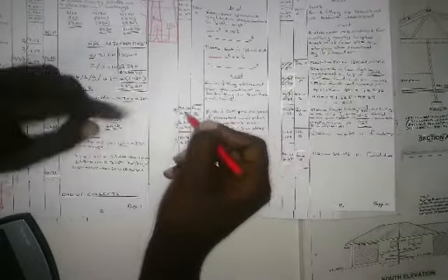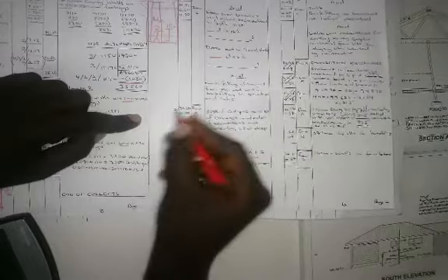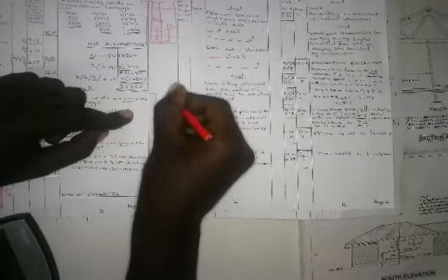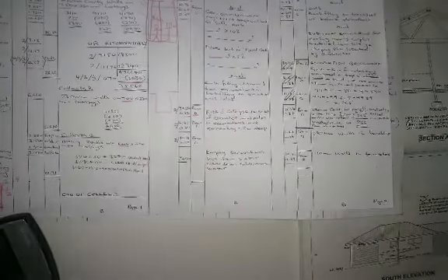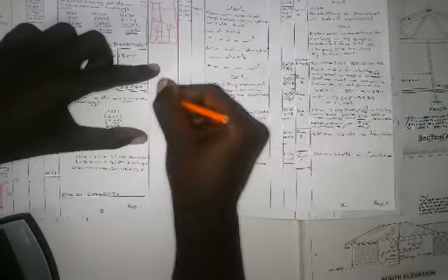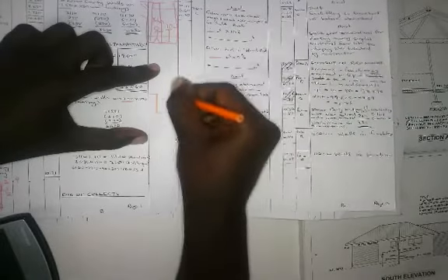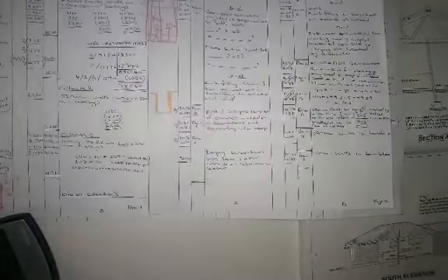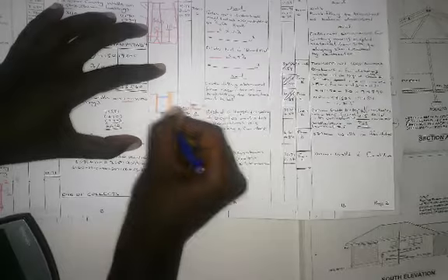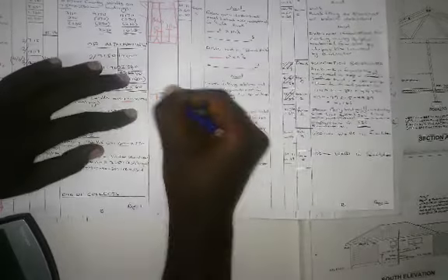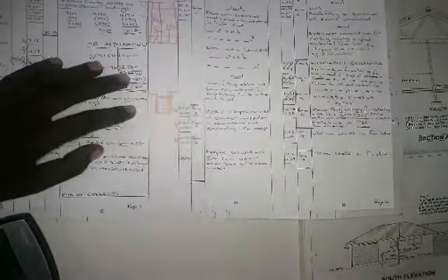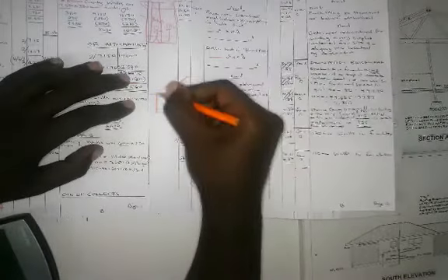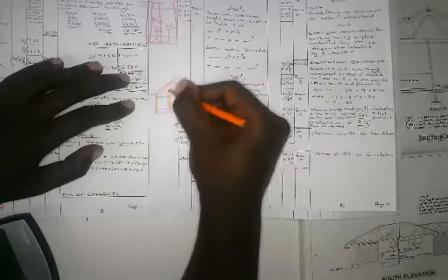This is the example again that your collections help you to measure out different items of work. So even your risk of collapse, you're going to use the same center lines. And remember, now you are shoring both sides of your trench, hence you're going to see that it has two. So let's say this is your timber planking. That is your trench, and that is your jack. You're going to do something like this.